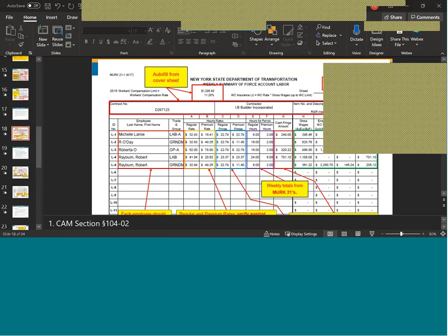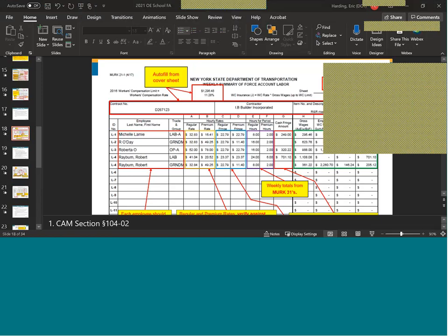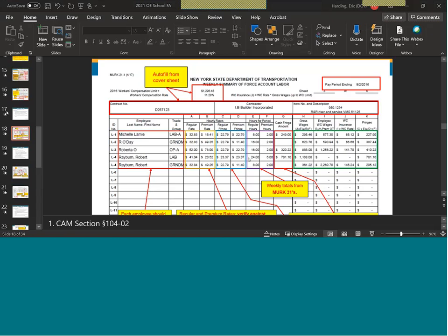And frankly, as I keep honing in on this question only I can see, if you can't come to a determination to split out what is contract work from what is extra work, maybe you're going to keep records on the entire operation and not pay it through your contract item. And I'll repeat the word maybe.